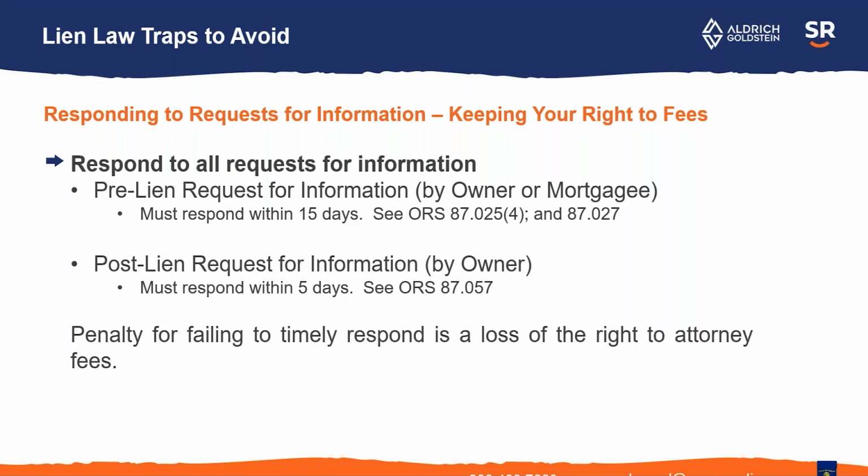There are various requests for information that you might be sent after you send a notice that you have filed a lien. And it's important that you respond to them or make sure that your attorney or your lien service responds to them for you. There are pretty short timelines, so just know one type of request you have to respond within 15 days. Another type of request you only have 5 days. So if somebody sends it on Thursday night and you get it Monday morning, you may have to respond that day.